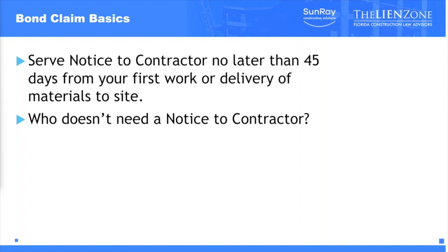So who doesn't need to get this notice to contractor? If you are a subcontractor on a bonded project, so let's say it's one of these condo towers, or it's a school board project that's bonded by the contractor, and you're the electrician, the subcontractor to the bonded contractor, technically you do not need to serve a notice to contractor to preserve your rights.